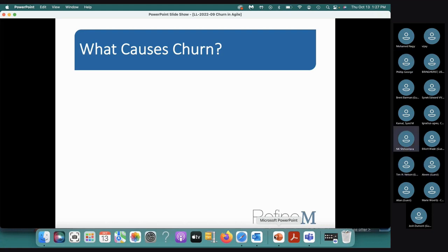Right. And that is how Scrum actually works, right? As per Scrum, you don't make any changes during the sprint. So any new request or new change goes into the backlog, where it is groomed and prioritized. And then if it bubbles up in the priority, it is picked up in the next sprint. So as per the sprint guidelines also, teams should not take any unplanned work during the sprint, right? That's how Scrum works.